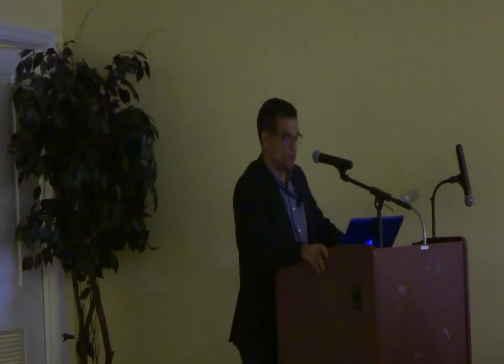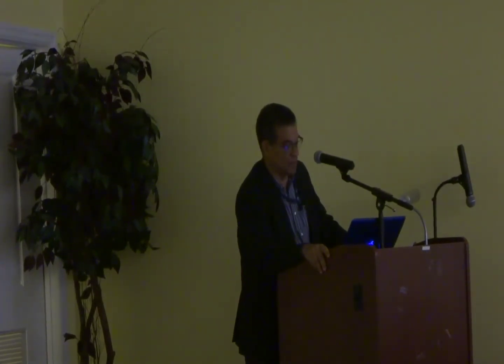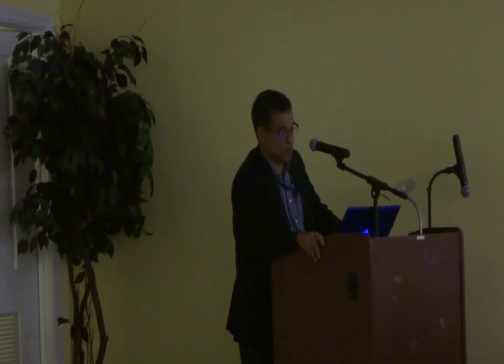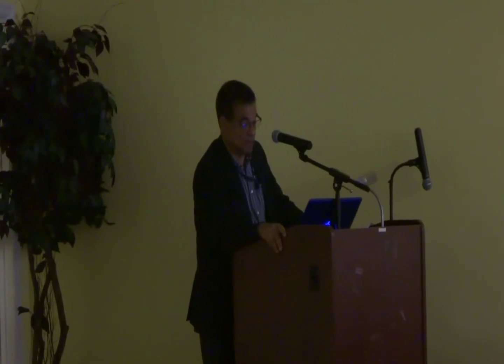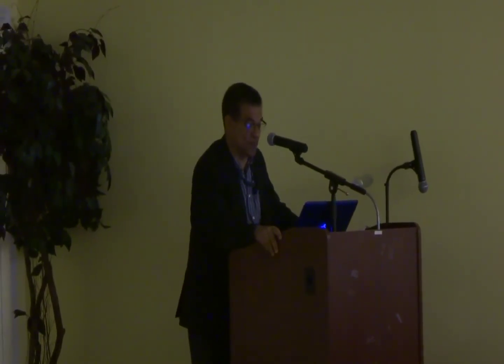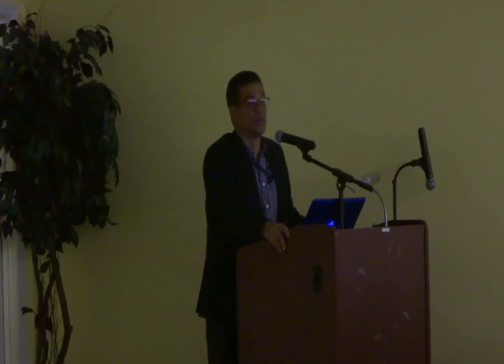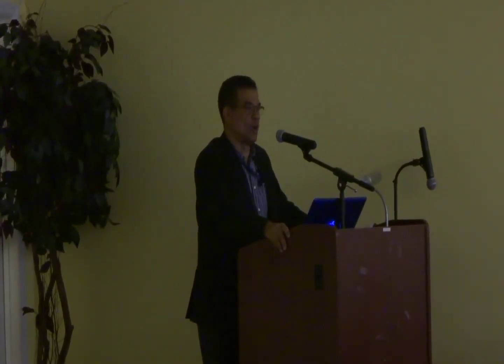offer, to execute and complete such works and remedy any defects therein in conformity with the conditions of contract, tender quantities and addenda for the sum of X dollars and cents, inclusive of value-added tax or such other sums as may be ascertained in accordance with the said conditions. So you see here the word offer. That's a legal word. That creates your offer.